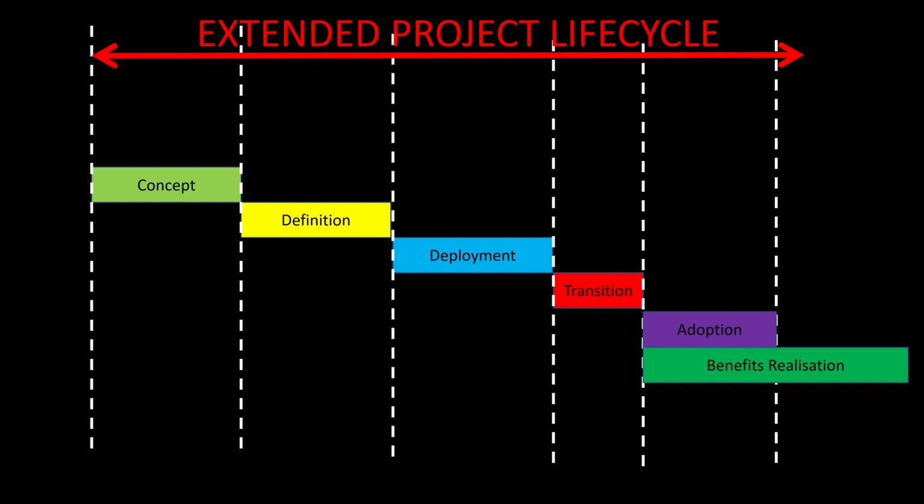If it was your project and you knew that the benefits were going to impact your business directly, you would definitely want to be keeping an eye on those benefits at the end of the project as part of the extended project life cycle, to ensure you were getting the benefits you expected. So this is a really important phase, even if the project manager often isn't involved in it. It's important that it happens and somebody is watching, going, all of that money we spent and all that time we put in, are we getting the benefits in reality, rather than, yes, I'm sure that will be fine. We need to measure that.